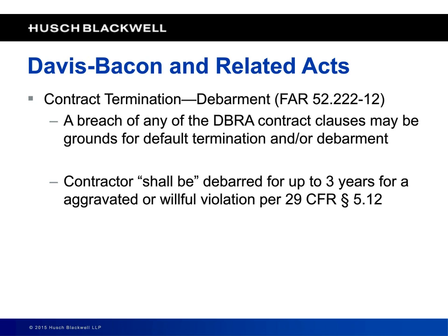But wait, it gets even worse. In addition to potentially having your contract terminated or being debarred, you also face possible False Claims Act problems. Now, I have a little bit of good news, and I'll get to this in a second, but when you look at the Davis-Bacon Act forms, the certificates of compliance, they are tailor-made for False Claims Act cases because they require you to certify that all the information is correct and proper and that you have authority and all those things. And if you get that wrong, and they can show it, it is tailor-made. It's a crystal clear violation of the False Claims Act.